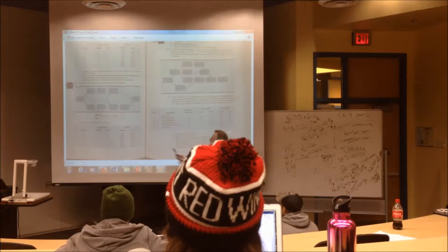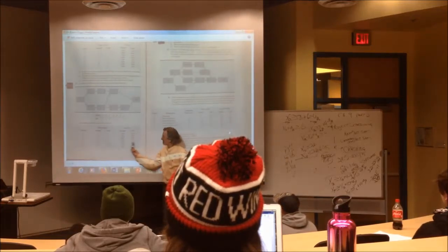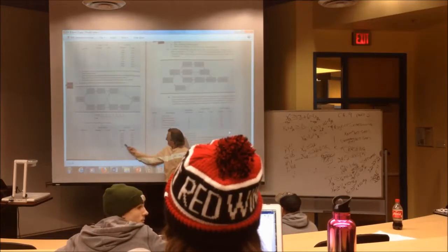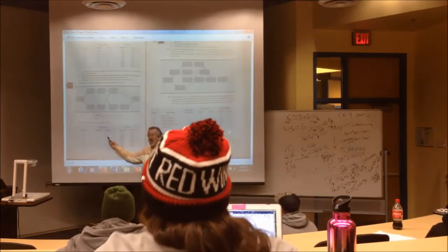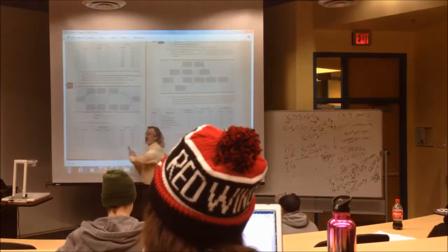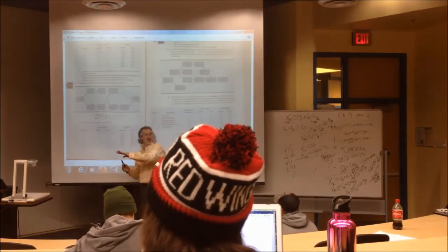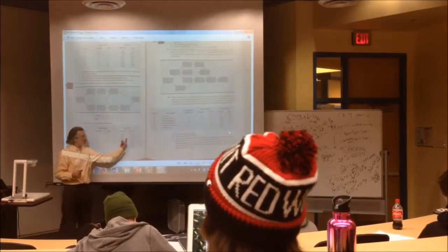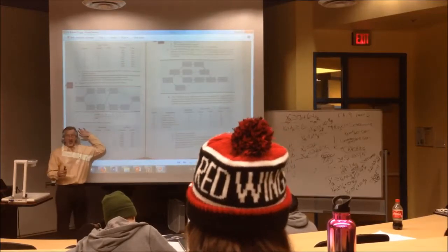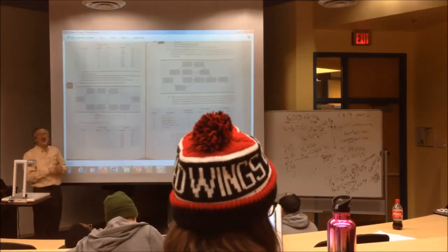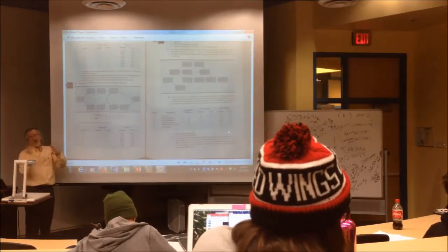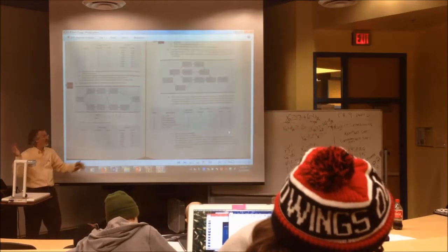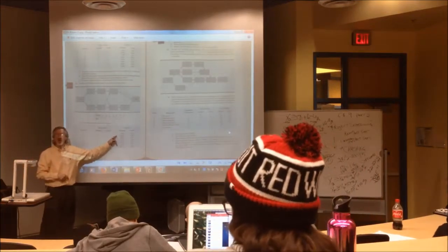Right here, you guys. These problems will give you normal and crash costs. It will give you a lower and higher cost, and it gives you normal and crash time. None of the other ones, like uncertain activity times, will give you this information because you only need this information if you're crashing. You won't even have the cost in any of the other problems because the cost has nothing to do with it. The questions are all about how long will this project take? What's the probability of this taking this long or more, this time or less? This is how you recognize crashing.